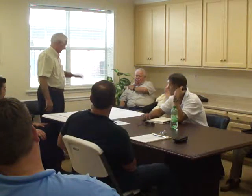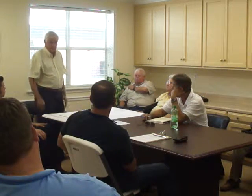When a component submits his price, he'll say 30 days, that's going to take me to do all this painting down here, whatever. Those 30 days are going to be taken by a GC, and they're going to be divided up. We're going to do this building in 2 weeks, and this building in 2 weeks. If we need more days, we'll coordinate that with the component. If it takes 45 days to make it work, then we're going to ask you to make it work. But we need to start somewhere. Given your number of days, if it takes you 60 days, put it in there, and then we'll work with it. It's going to involve us helping work with the GC and components to make this work.